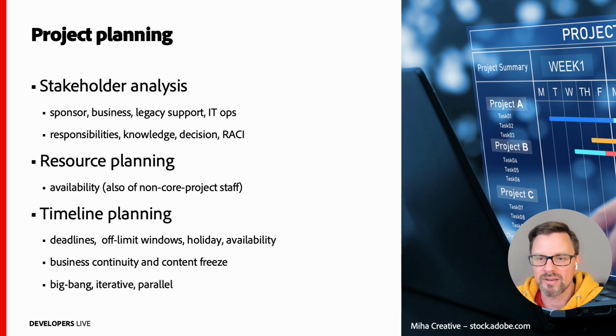All this is not planned in a vacuum, but needs to be closely aligned with the technical planning. For example, how do you want to migrate? Continuously synchronizing, running the legacy and the AEM system in parallel for some time, or in a big bang fashion. Plus, check how long the execution takes and how business continuity can be ensured during that phase.